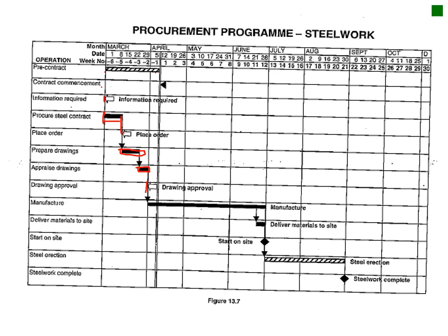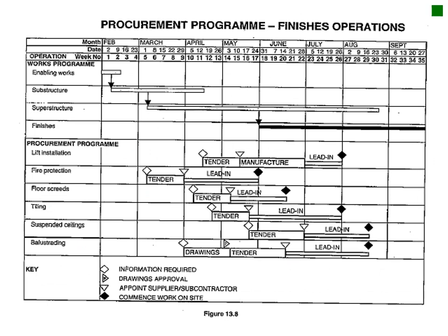Okay, and then you've got a manufacturing time which starts here, and okay, the previous one, that commencement was actually this date when it had to commence, but that was for the manufacturing. The actual erection only starts here, so start on site. So you see there's your stage gate, you have your delivery time there, and then you've got your actual steel erection there and steel completion there. Okay, so very straightforward procurement program.